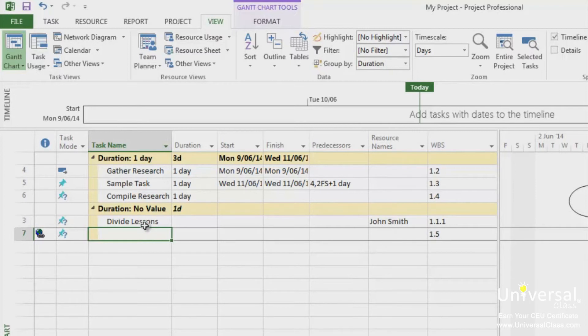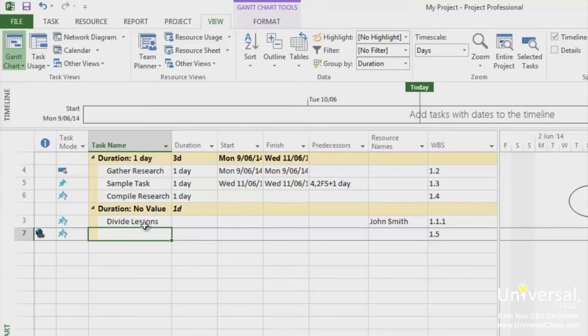A custom group has three elements. Field name, field type and order. An example would be if you created a group that showed the field name and field type in a certain order. So descending or ascending. A group that was created to show tasks in descending order would list tasks in order from the longest to the shortest duration.